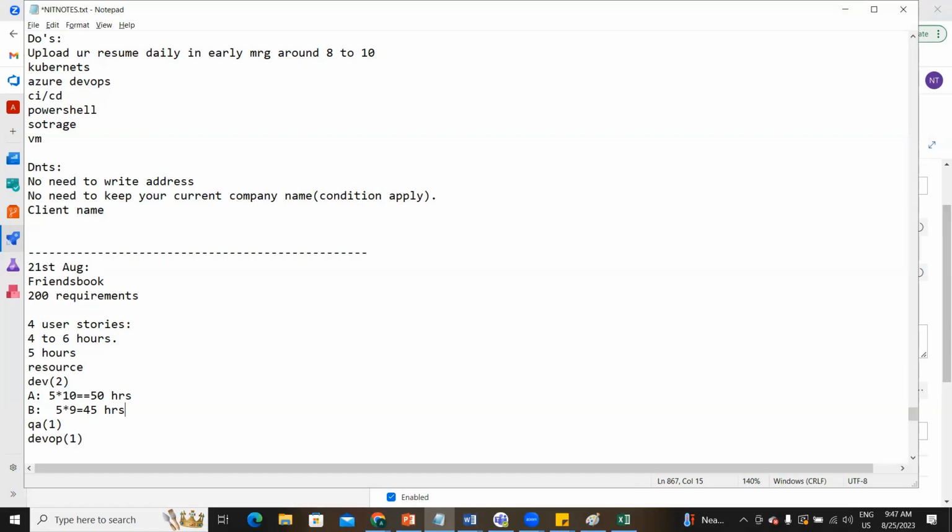So my question is, how many stories will I pick? Here, the developers, how many hours will they work? 95 hours total. Now, how many guys are there for DevOps? Only one. And he's saying, I'm good, I don't have any marriage, I'll come every day, so I'll go with 50 hours. DevOps is very smart, saying 1 marriage day, 1 birthday, so I'll go for 8 days only, I'll come for only 40 hours, boss.